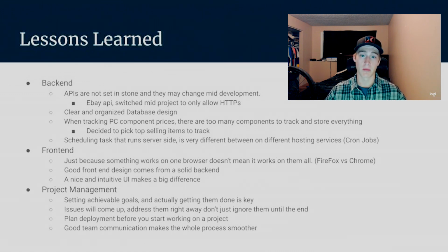We also learned a few things about project management. First, setting achievable goals and meeting these goal deadlines is important. We were super good about this on the first half of the project, lacked a little bit around spring break and the COVID-19 fiasco, but we picked it back up on the final push, and it really helped us complete our project. We also learned that issues will come up, and it's best to deal with them then as opposed to later, because when you do fix them, other things might change, and you don't want to be dealing with that when you're trying to deploy the app versus when you can just deal with it right away.